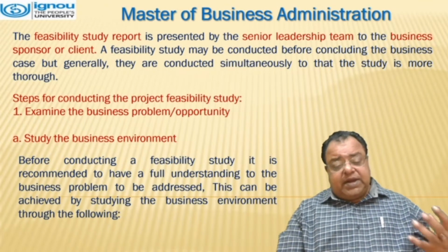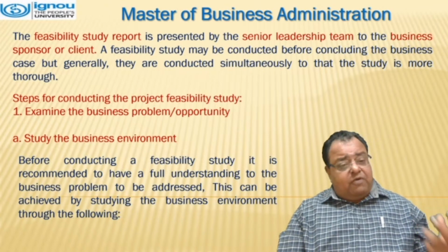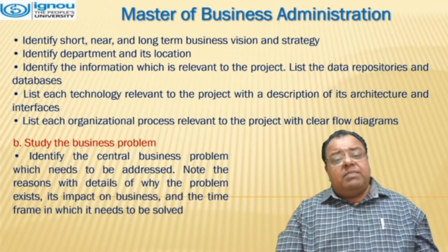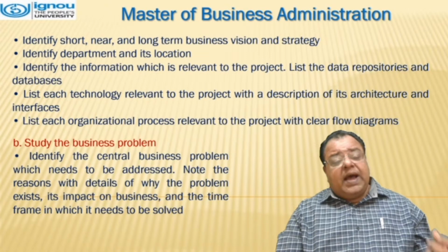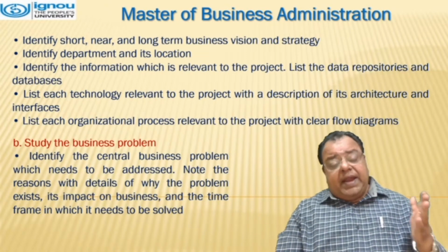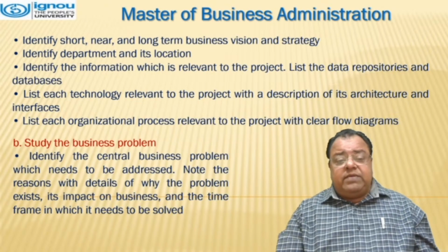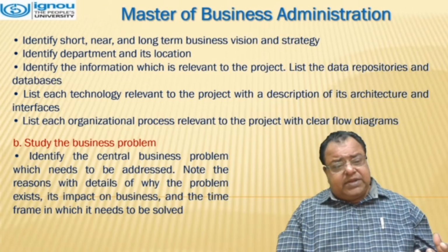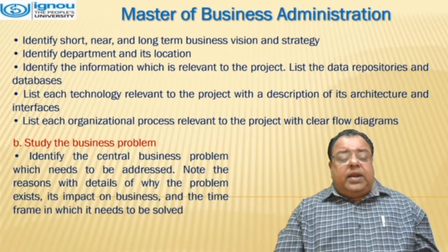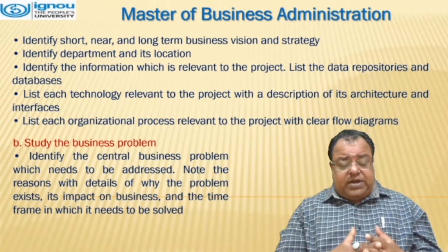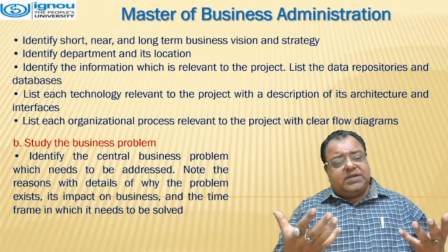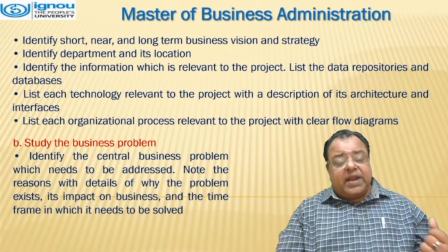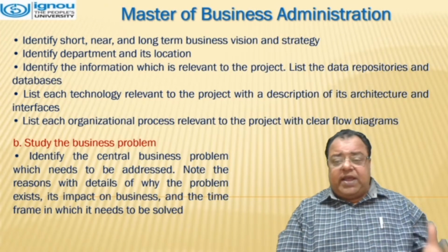This can be achieved by studying the business environment through the following: identify short, near, and long term business vision and strategies, identify departments and their locations, identify the information which is relevant to the project, list the data repositories and databases, list each technology relevant to the project with the description of its architecture and interfaces, and list each organizational process relevant to the project with clear flow diagrams.